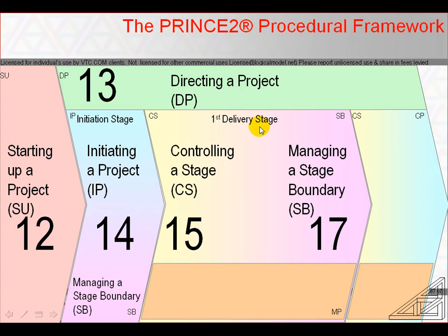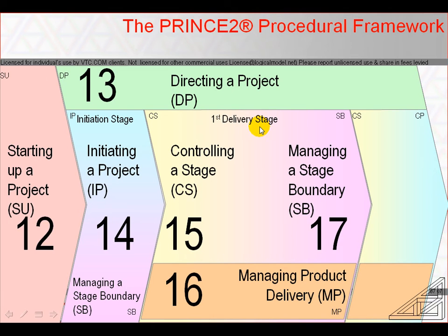These team members and team managers perform their discipline-specific activities such as welding or graphic design, bricklaying or software testing, as well as 3 PRINCE2 activities within the managing product delivery process. The dialogue between the project manager and team members and team managers maintains control over the allocation of work and the reporting of achievement. It may be that the first specialist stage is also the last, but even if it